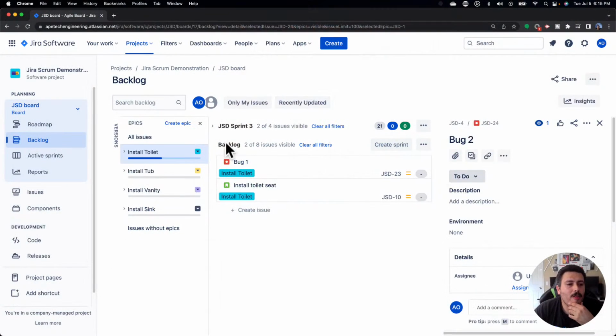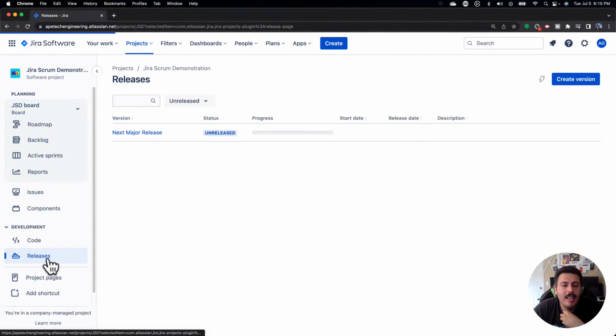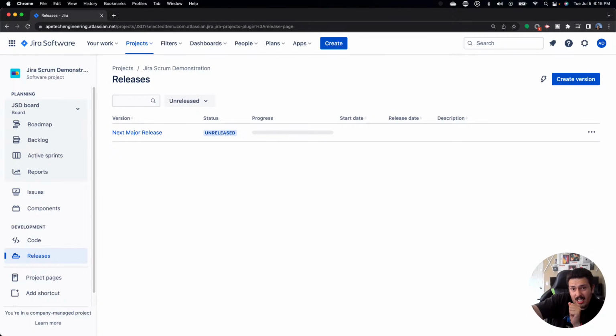So what we're going to transition to next is talking about how to think from a tactical standpoint and how to really leverage these epics to help you get some traction. And so one of the first things that I like to do is I like to look at releases from a quarterly perspective. I don't like doing year-long planning because so many things can change in a year. I don't like half year either because again, so many things can just go astray within a year. And I really do love quarterly because quarterly is close enough that you can touch it.